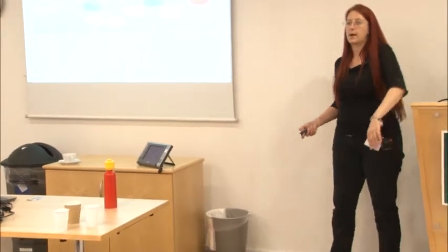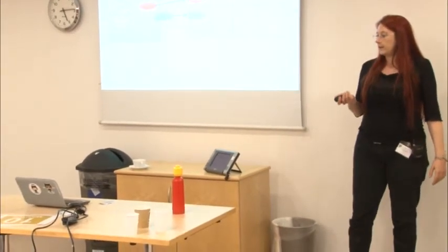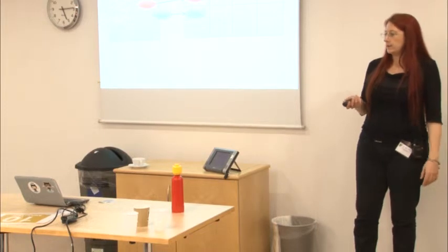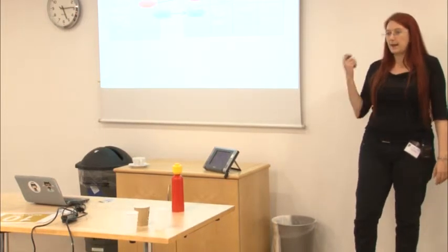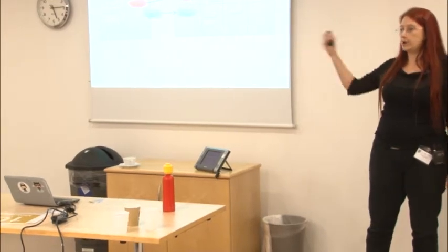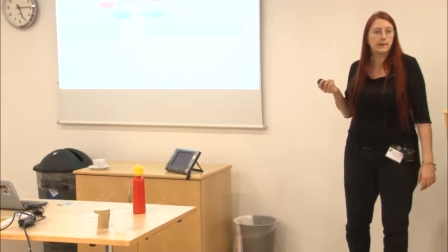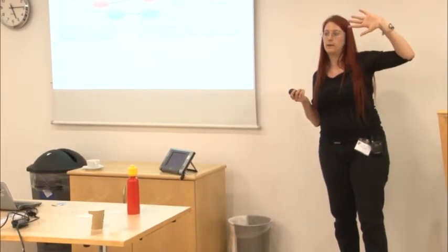They agreed that what we had come up with, what we had decided, was reasonable. So here's what it looks like. We take the capabilities, we put them on the board, we split them into features and stories, and then they travel like normal. And we tend to give the capabilities each their own swim lane, just so you can track all the stuff that's associated with it. And we hit the 4s and 5s first these days.